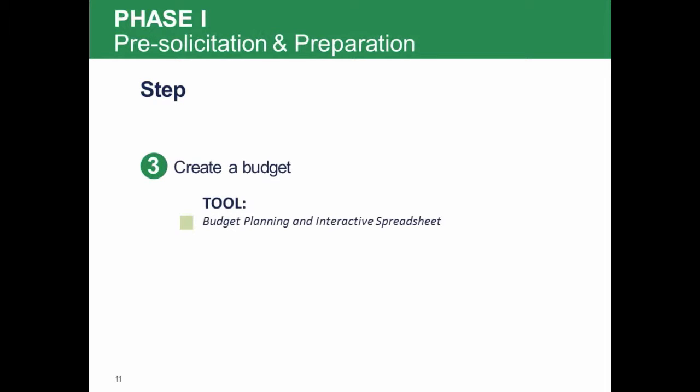Major cost components may include the EHR system and license fees, interfaces and health information exchange costs, computing hardware, such as ancillary devices and equipment like printers and scanners, network and communication costs, including network and internet service providers or ISP fees, and vendor services costs, such as for training, implementation, and system upgrades.